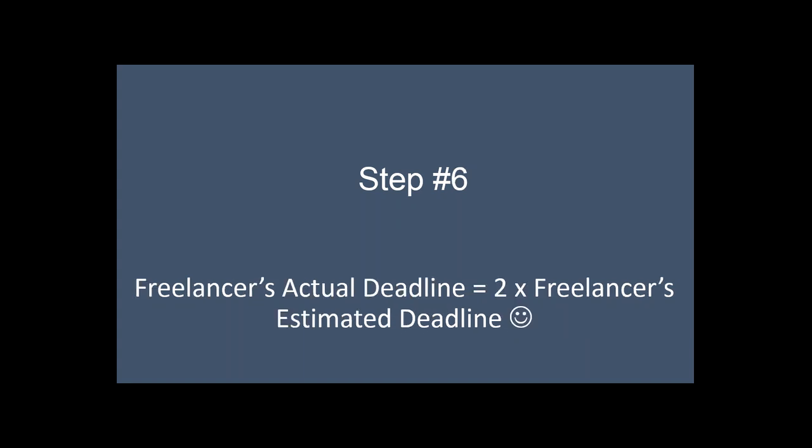All right. Now, the next step is the freelancer's actual deadline. If you have ever worked with freelancers, I can tell you from my experience that a freelancer's actual deadline is equal to 2 into the freelancer's estimated deadline. This is a fact, no matter how good your freelancer is.